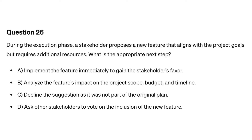Question twenty-six. During the execution phase, a stakeholder proposes a new feature that aligns with the project goals but requires additional resources. What is the appropriate next step? A. Implement the feature immediately to gain the stakeholder's favor. B. Analyze the feature's impact on the project's scope, budget, and timeline. C. Decline the suggestion as it was not part of the original plan. D. Ask other stakeholders to vote on the inclusion of the new feature.